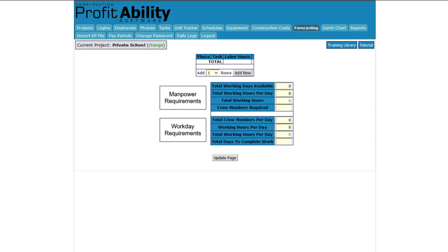It's always better to finish early than to finish late when you make completion predictions. You can finish 1 hour late, and they'll always remember you finished late. But if you finish 1 hour early, they will think you're psychic. So I always recommend that you add 10 to 20% more time to your prediction, depending on complexity.